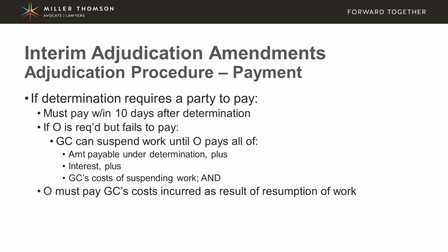So the demobilization costs that are incurred by the general contractor, meaning to take all its men off site, to take its equipment off site, all those costs also have to be paid by the owner. And the owner must also pay the general contractor's costs when it comes back to the job site. So the remobilization costs, so to bring everyone back to site, to bring all the equipment back to site, those costs must also be incurred.